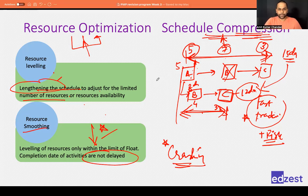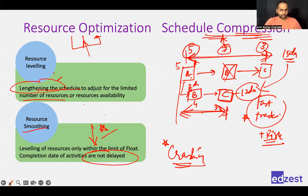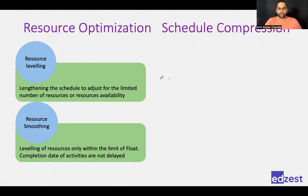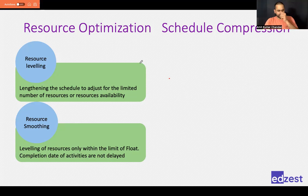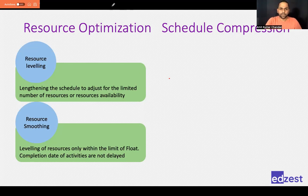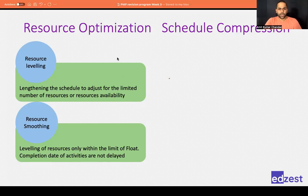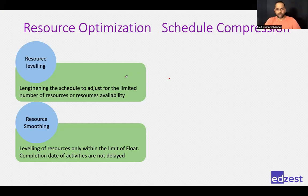A participant asked whether resource smoothing and crashing are the same. The distinction: resource smoothing's objective is to use the same number of resources throughout the project and complete on time — it is about resource optimization. Crashing's objective is to reduce the schedule duration by adding resources. With fast tracking, you add risk and potentially reduce quality. With crashing, you add cost.